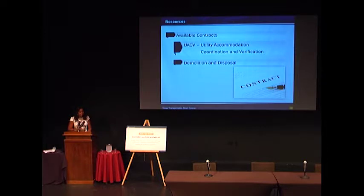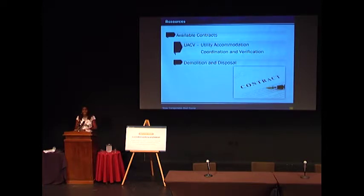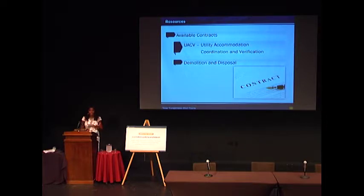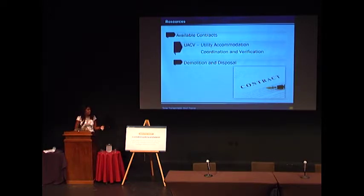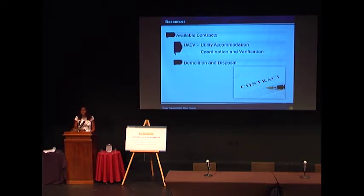Another resource we have available is the use of demolition and disposal contracts. The expectation is still for utility companies to go out and clear the right-of-way in preparation for their relocations, but there may be instances where you have a need to expedite this activity. One example is where you have a project with all non-reimbursable utilities — what utility is going to raise their hand to be the first to bear the cost of clearing the right-of-way and let all the others benefit from it? So when you have those types of instances, use the demolition and disposal contracts so that we can have the right-of-way clear for the utilities to move.